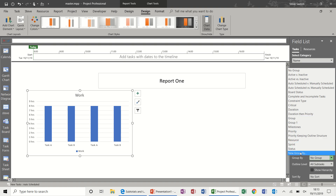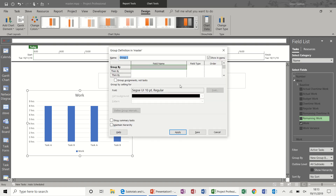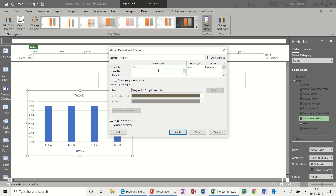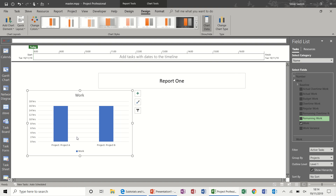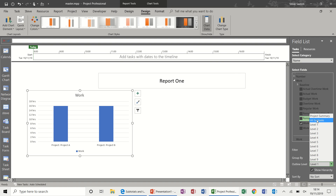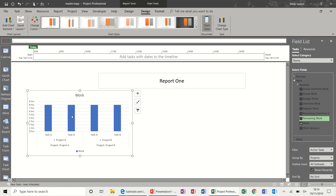I'll create a new group and call it Projects, then from the field list select Projects, and apply. This gives you Project A and Project B. If I then change the level from level one to all subtasks, it breaks down between the two projects. That's the first chart done.